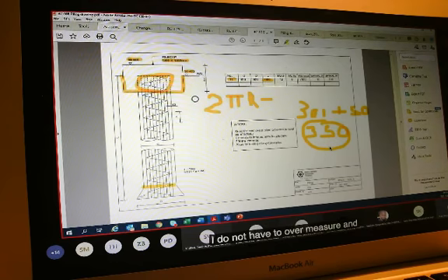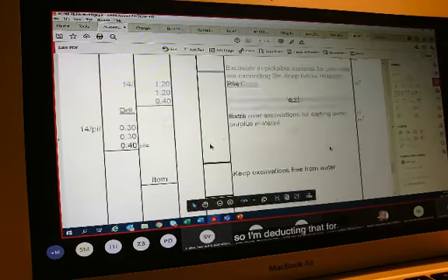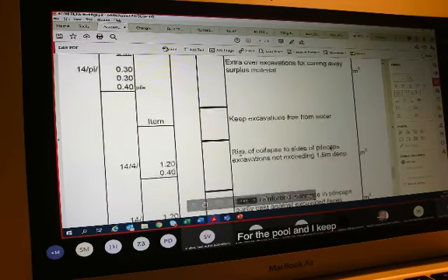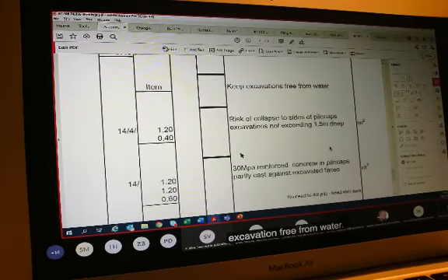So it will be 1.2 by 1.2 by 0.4, and I have 14 of them. And I'm doing a weird thing here, and I'll accept this. You guys are big now. You have your big shoes on now. I will now use the deduct in here. I will accept the deduct if you place that over there for me. But you need to still indicate that it's deduct. And I'm deducting the pile, and it's 0.3 by 0.3 by 0.4, the same depth, times pi times 14.